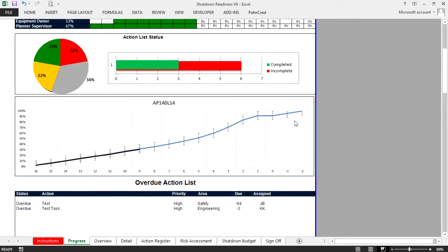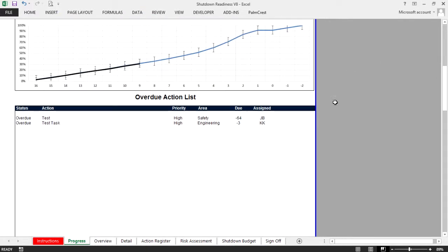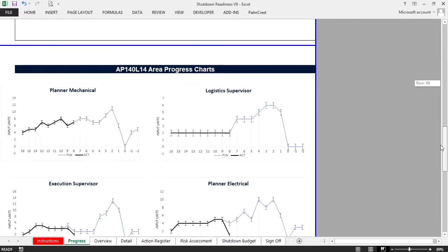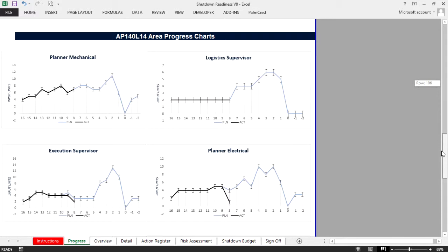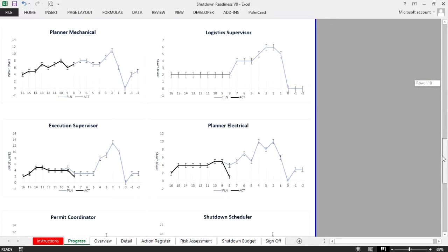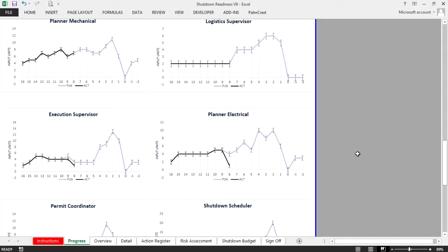The actions that we've listed are showing that 34% of them are closed. However, a large percentage is still open and some are overdue, and this is all of our overall actions. We have a simple S-curve of what we need to achieve and what we're currently achieving, so we're not too far off the mark. The nice thing about this is the overdue action list prints itself on this particular report, so it doesn't show all the actions but just the overdue actions.